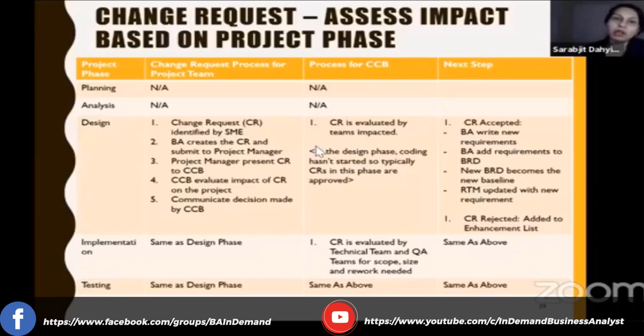In the agile environment, you're typically using tools such as Jira, or any other tool, which has ticket numbers. Then you move something from the product backlog into the sprint backlog, then it's something you're working on actively, then it's handed over to a developer and then to a tester. So you see the progression of requirements from the product backlog until it's delivered.